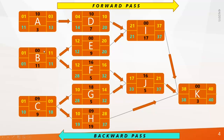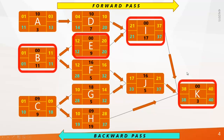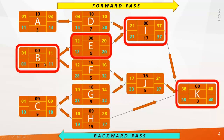Total float of activity A is 11 minus 1, which makes 10. For B, it is 1 minus 1, which makes 0. Activities with a float of 0 are B, E, I, and K. These are called critical activities, and the path through them is called the critical path. Delaying critical activities results in delaying the project because the critical path drives the total project duration. Summing the durations: 11 plus 9 plus 17 plus 3 equals 40.